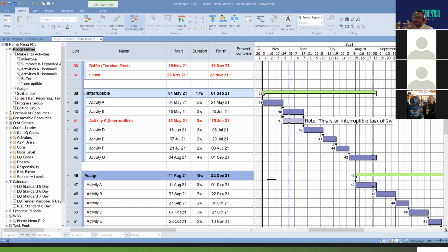But even though it's the most common way to do scheduling or programming, it's not always the case. Like I said, in the example of the Tokyo Olympics and the need to build the stadium, you could use a backward pass when you know that you have a constrained finish. From a constrained finish date, you could work your way back to determine when the earliest start of that project will likely be and how to resource accordingly. That instance is called a backward pass in terms of scheduling.